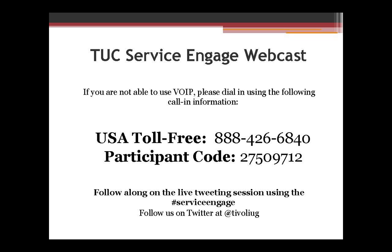Yeah, one other nice benefit, and Liz, as she's been tweeting, used the industry term, which is good, the full stack developer, the developer who's able to work on any part of the stack of the application. The other benefit from a planning perspective is that execution of a plan becomes much easier because you don't have to wait for a scarce skill to become available. Say Barlock was the only guy that knew the database, and we had two features that needed database attention, then we'd have to wait for Barlock to free up. If you've got a team of full stack developers, any developer can take the next task from the Kanban board. It takes an investment because nobody on day one knows the full stack of an interesting application. But if you invest your time in getting each of the developers skilled up on the full stack, it makes planning and execution a lot simpler.